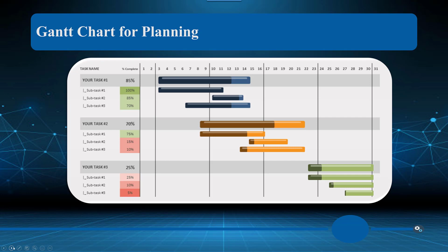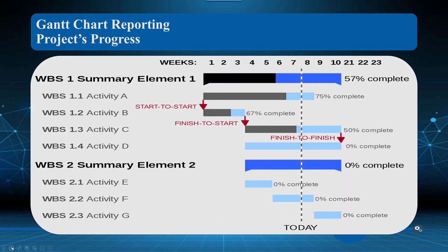Okay, so this is a nice example of a basic Gantt chart. As you can see, it is easy to read. We can see that we've started tasks in task 3 and some subtask stuff. We're not very far on that. That is most likely very independent, non-dependent on the previous task. If it was dependent, then we're going to need to complete this or be closer to completion before we start a dependent task. So keep that in mind.